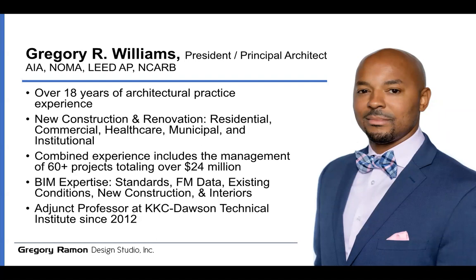I know that some architects are self-certified. I believe that's the term. Yes. And what does that mean exactly? So self-certification is a certification status with the city of Chicago that basically allows you to self-review your drawings. You still submit it to the Department of Buildings, but it allows you to review it, and then it bypasses the review from each of the different trade reviewers at the city, different disciplines.